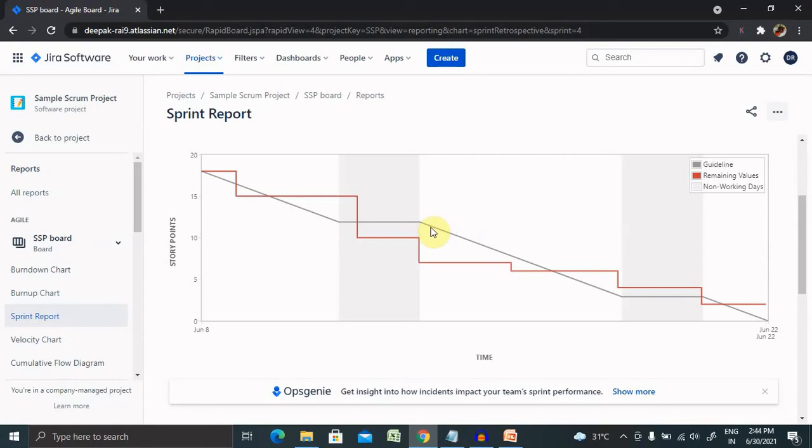The red line shows the current total estimates for unresolved issues at any point in the sprint. It also reflects issues that are added or removed from the sprint.